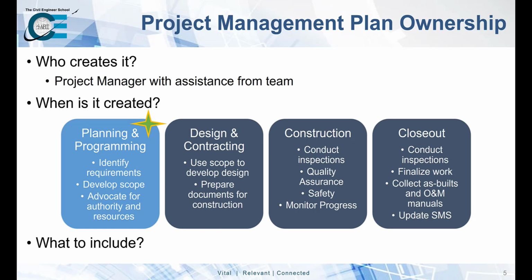Planning can often begin far ahead of project execution. It is not uncommon to spend more time developing a project management plan than it takes to construct a requirement. Take the Hoover Dam and the Black Canyon of the Colorado River, for instance. Initial planning for development began in 1922 and continued until President Coolidge signed an authorization bill in 1928. It wasn't until 1931 that drawings and specifications were made available to interested contractors. Construction of the dam itself took only 5 years, and it was complete in 1936. This compared to the planning phase that spanned over 9 years.